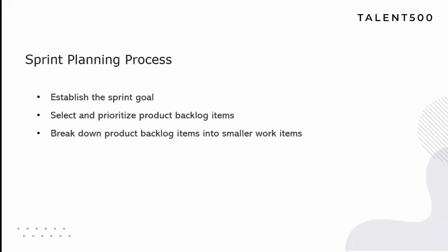Consider a Scrum team plans to pick up a few backlog items. During the middle of the sprint, they realize that they won't be able to deliver all of them. They will now have to narrow the scope of the sprint. However, which PBIs should be prioritized above others? Making this choice is challenging without having a clear sprint goal.